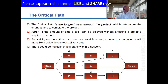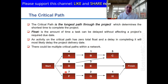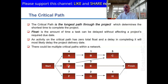Let's look at a schedule. We have the start point on the left and the finish on the far right. From the start, three activities immediately begin: A, D, and F. A is four days, D is eight days, and F is seven days. They are not start-to-start sequentially — they start at the same time, like a race where everyone starts running simultaneously. A finishes first at four days, D finishes last at eight days.